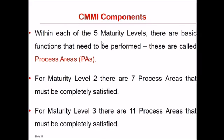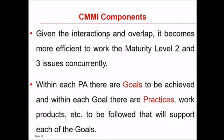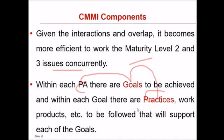Within each of the five maturity levels, there are basic functions called process areas (PAs). From maturity level two, there are seven process areas that must be completely satisfied. For maturity level three, there are eleven process areas. Given the interaction and overlap, it is more efficient to work on level two and level three issues concurrently. Within each process area there are goals to be achieved, and within each goal there are practices to be followed.